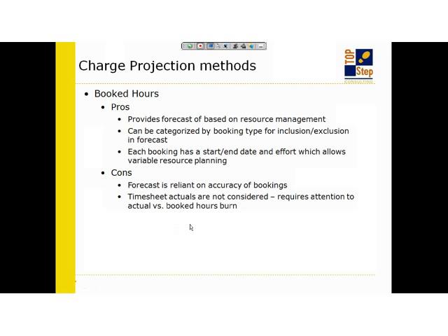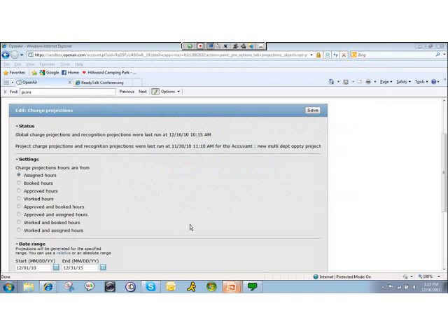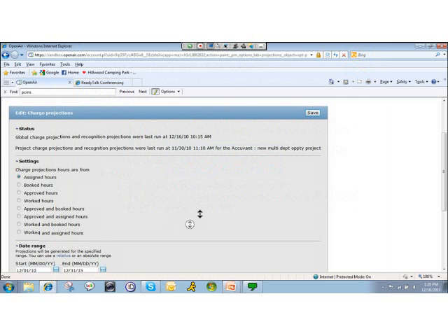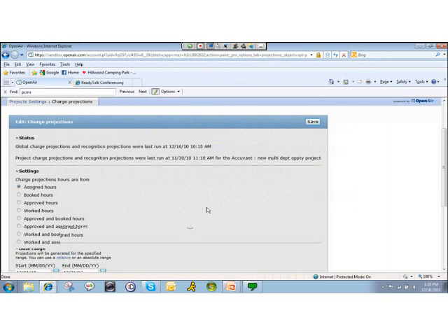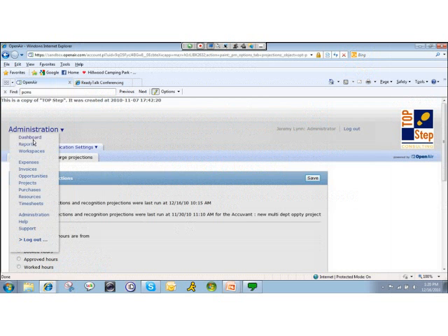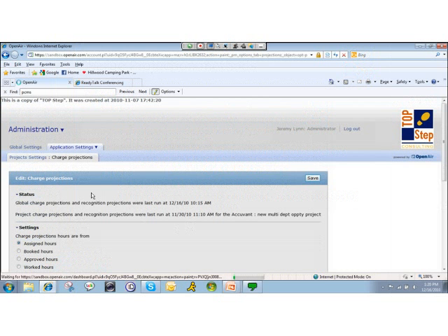And for those of you who are working bookings, that tends to drive things like booked versus actual, periodic checks to make sure people are actually burning. And what I do instead of running a report like that is, because I use bookings in my system, I actually use a dashboard that shows me the burn based on client work, based on people, of when I expect somebody to work something, is it being worked?